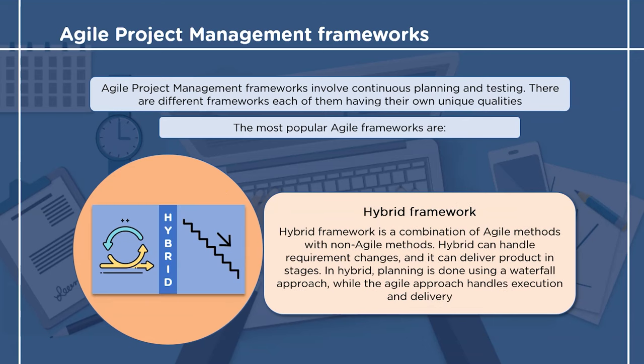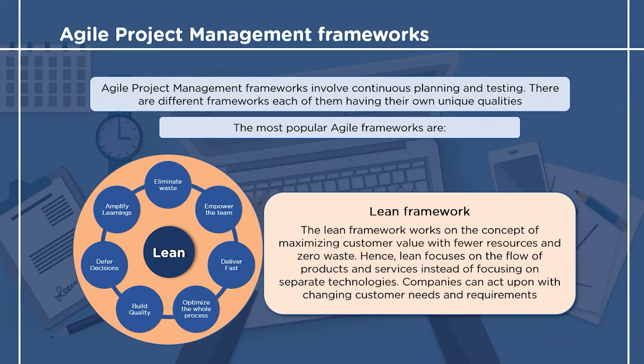The third framework is the hybrid framework, which is a combination of agile methodology and non-agile methodology. In a hybrid framework, planning is done using the traditional way of project management while execution and delivery is done using agile methodology. Since hybrid is a combination of the two, it handles requirement changes and delivers the product in different stages.